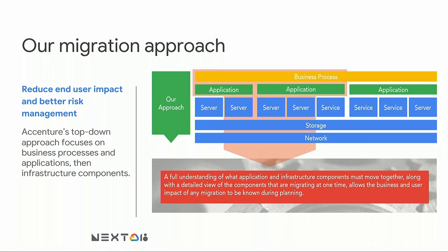So you start by talking with the business, understanding which business units want to migrate, make sure they understand the value of that, and then naturally you should start to see business units that are early adopters, or groups even within business units that are early adopters, and some business units that want to migrate later or last. From there, then you can start to dive into their applications, the different environments, get to your servers and your shared infrastructure.